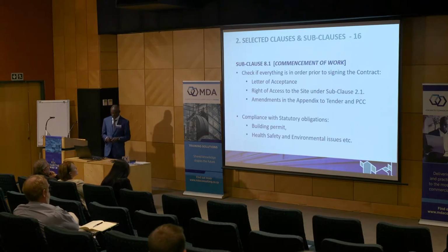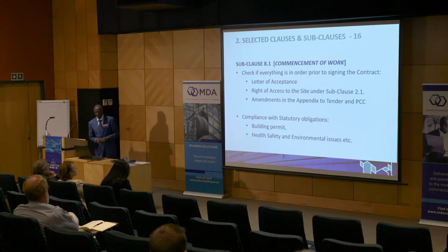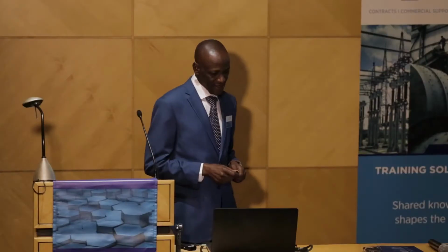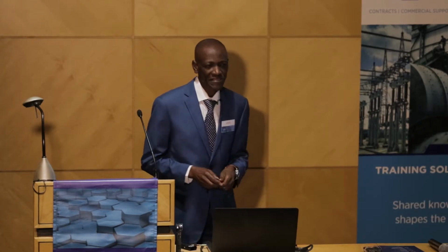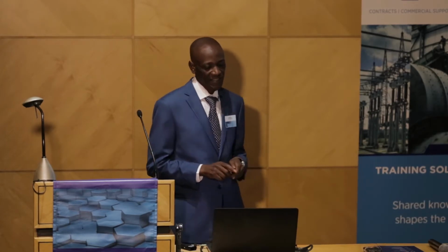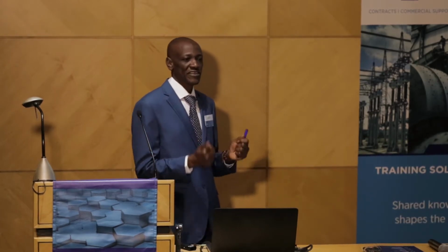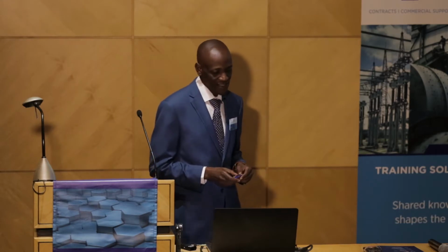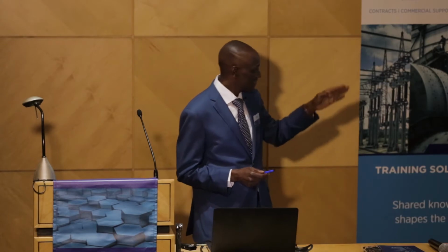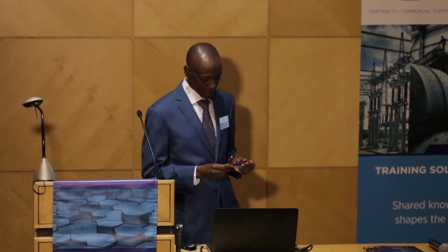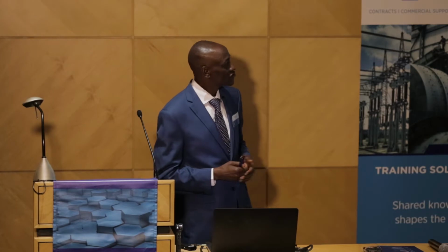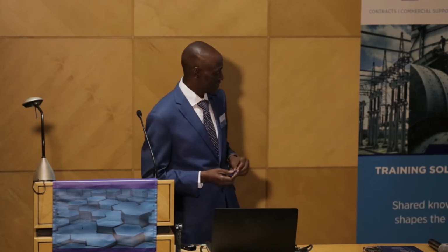Another subclause I've selected is commencement of work. Once the contractor has been given the instruction to commence, which is given 7 days after the issuance of the letter of acceptance, he should check to make sure that everything is in order. The commencement always starts, unless specified otherwise, 42 days after the letter of acceptance.